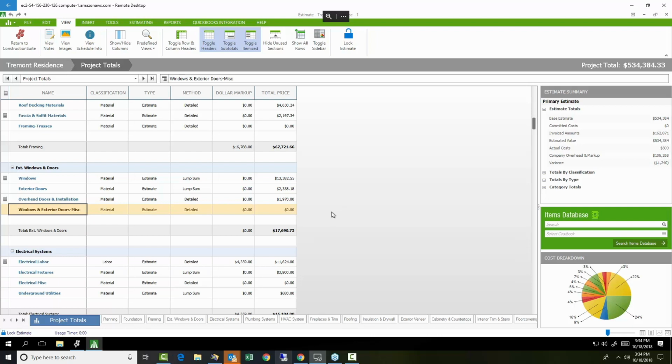Now again, this is going to be a big time saver because we don't have to go in there and try to match up the names. We don't have to go in and try to adjust all the codes or the costs or anything like that. We're just going to go in and use the pieces that are already here, but maybe didn't get applied in the beginning. So keeping them as part of your estimate template and having a more expansive template saves us a ton of time in the long run because it's all going to be there when we're ready for those change orders.